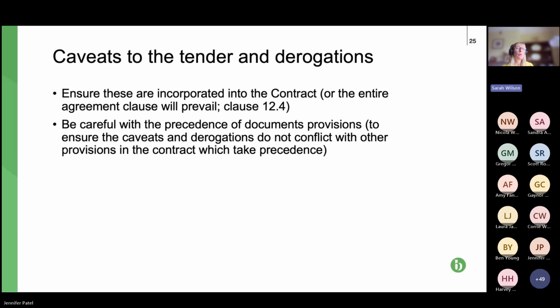The risk there is, and of course the contractor or subcontractor will base their price on that basis. So, if asbestos is discovered, it's a compensation event. We get paid extra money, we get additional time for it. So it's really critical that those requirements and caveats are incorporated properly into the contract.